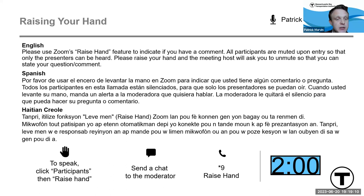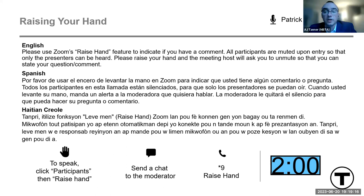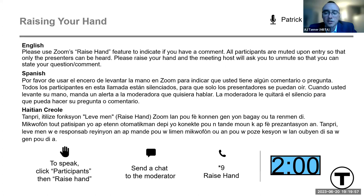Will Valley Road have the same configuration? Yes — the future configuration for Valley Road will be a center island platform similar to what was shown in the video. Regarding the $20 million cost for Valley Road: the estimated construction cost includes provisions to make the station fully accessible using walkways and ramps. Due to the significant difference in elevation from the street — the only access point — significant ramp structures and retaining walls are needed, which drives up costs compared to Capen Street, which is already at street level. However, it will be accessible and the cost to achieve full ADA compliance is included in that estimate.